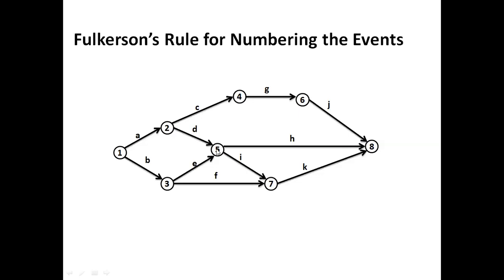And again here, 2 to 5, the process is flowing, or the project is progressing from 2 to 5, then 5 to 8, or 5 to 7. But you cannot say that 5 to 3. So the process is progressing in 5 to 3. It cannot be said here, because the tail number and head number should be in ascending order, 3 and 5. The process flows from 3 to 5.